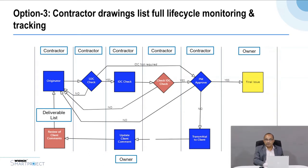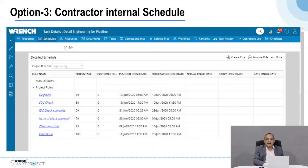If the contractor provides an internal schedule of drawing creation — starting from their internal creation phase, review stage, and submission to the client — you can track the contractor's activities with plan dates and monitor their internal progress to ensure drawings are submitted to the owner on time.